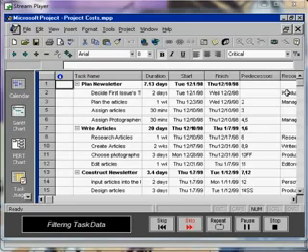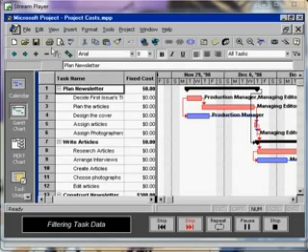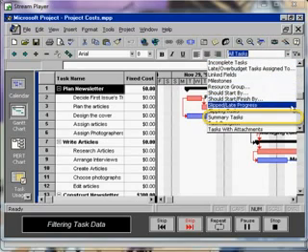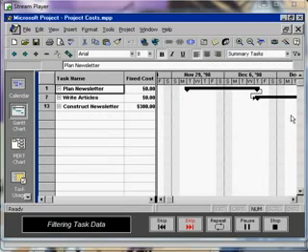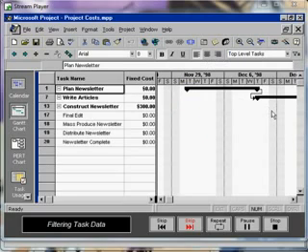The Gantt chart can also be filtered to show only selected information. We need to open the View menu and select Gantt chart to filter its data. From the filter list, we'll choose Summary Tasks. This collapses the view to include only the summary tasks. Notice the black graph bars. If top-level tasks is chosen from the filter list, it displays only the most important tasks for the project.